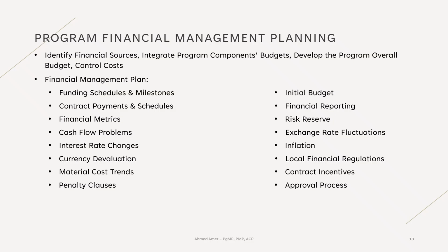Creating the program's initial budget means gathering all available financial information and laying out income and payment schedules clearly enough that costs can be tracked throughout the program as part of the program budget. Once the program budget is baselined, it becomes the main financial target the program is measured against. Finally, the program needs financial metrics to measure the planned program benefits.